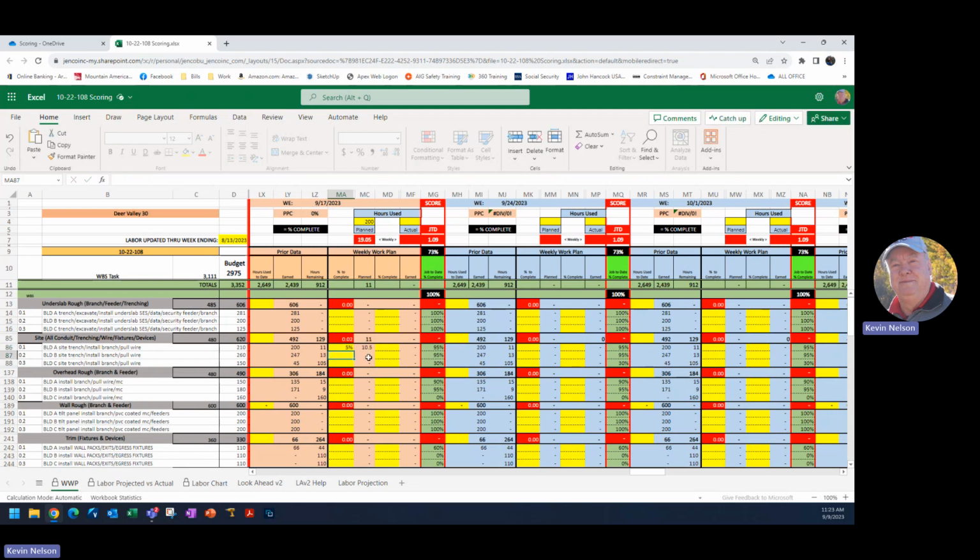And if you could see what the calculation did, it said, okay, your planned earned hours currently are 11, but we've got 200 hours that we want to plan around. If that's all the work that we did, you'll recall from the What is PAR video, my hours worked divided by hours earned would give me a PAR score of 19.05.